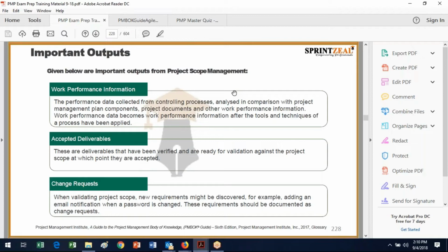anytime when you're looking at parts of the project, there might be new requirements discovered, because at the bottom level of the work breakdown structure, it doesn't completely cover the waterfront, and so you want to make sure that you add the things that are necessary. Now, this is not gold plating, this is just completing the work, because, for instance, you don't want to create a laptop with no means to charge it, so you've got to have the power brick and the power cord.